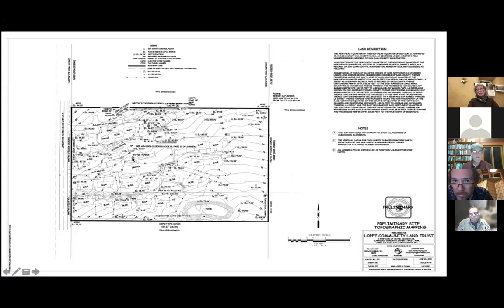So, this is say a 7-acre site, and it's developed in maybe 5, 6, 7, 8 passes because you don't have enough money to do it all at once, because if you think about it, to develop a single house on a piece of property, you're going to spend between $70,000 and $100,000 just on infrastructure, getting your stormwater and driveway and all your utilities and rainwater and all of that set up.